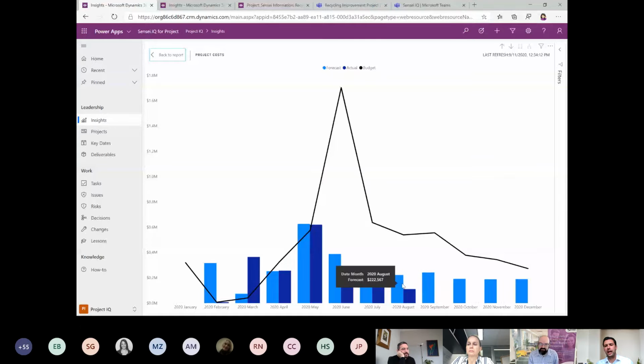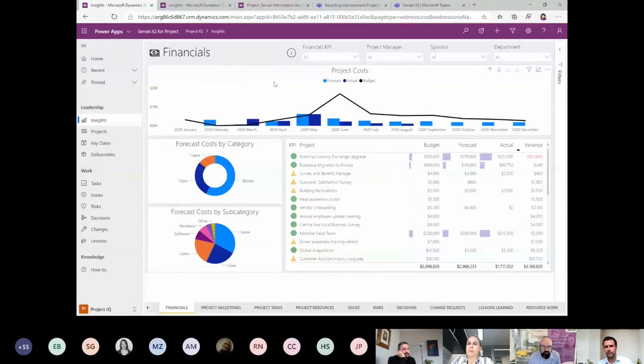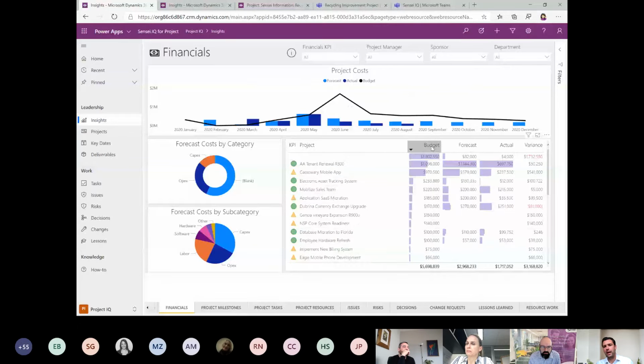So we've looked a little bit now at how we track what has been done and whether things are on track. But for the future, to see how likely this is, and again, what we look at week by week. So if I can see here our budget, our high level projects, we get to see the variance overall for the project and how it's tracking against its initial budget. But we're probably trying to go a little bit deeper to find out where we expect spend for next period, and then how to see if that's going to be correct.